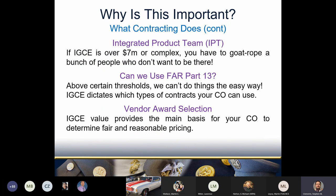IGCE value also dictates more than who signs off on documents. It's possible you'll have to form an Integrated Product Team for your acquisition, meaning you'll pull in people who'd rather spend as little time as possible on the contract — more meetings, more paperwork, more time added to the process. Dollar value also decides what kind of contract instruments contracting can use. Above the simplified acquisition threshold, your CO generally can't use the easier ordering tools offered by FAR Part 13.